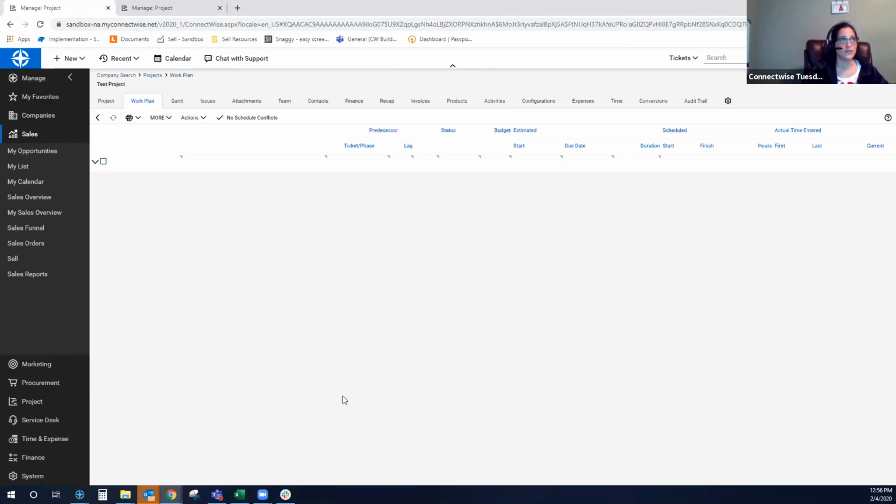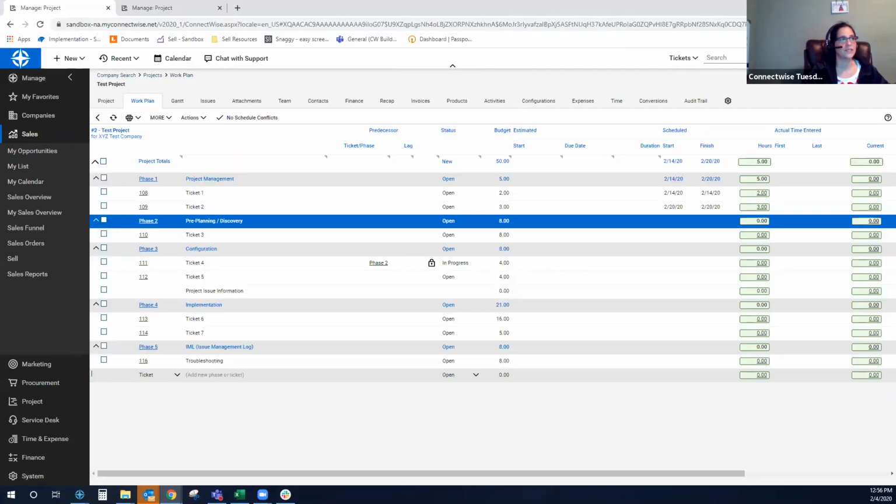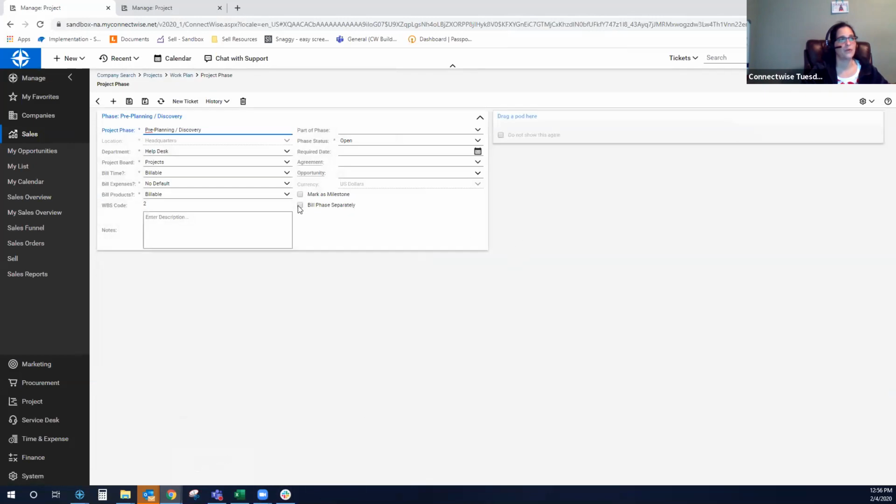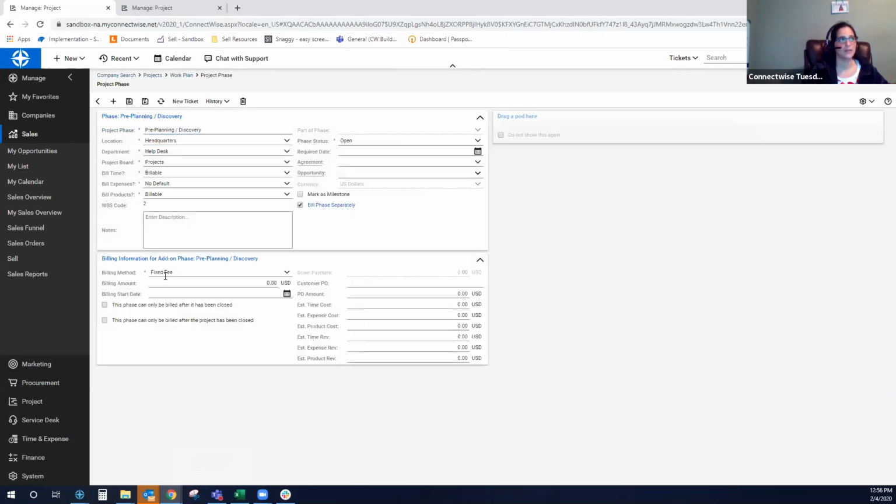So for those of you that aren't aware what phase billing is, I can say phase 2, I want to bill separately as a fixed fee, and maybe I'm going to invoice for a fixed fee of $5,000. I'm going to send you your first invoice of $1,500 after we complete the additional discovery phase in our pre-planning. I can make this be $1,500. Now, I do have to keep in mind that if I put this $1,500 in here, I need to detract that from my original setup of a fixed fee of $5,000, so I'm not invoicing my client $6,500, okay?